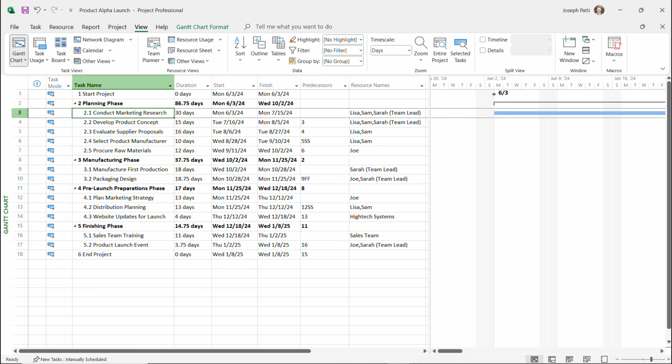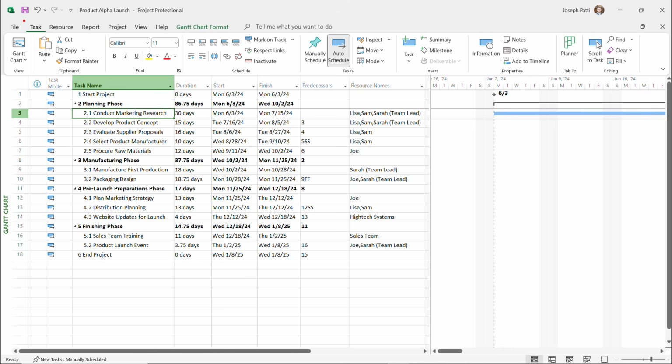We've 100% completed it. So we're going to go over to the Task tab, and inside of the Task tab, we're going to head over to the Schedule command group. You'll see up top we have different increments of percentages of complete. So I could say something wasn't completed, or 100% completed, or I can use any of the other ones as well. Let's say that I click on my 2.1 task, and I'm going to then click on the 100%.